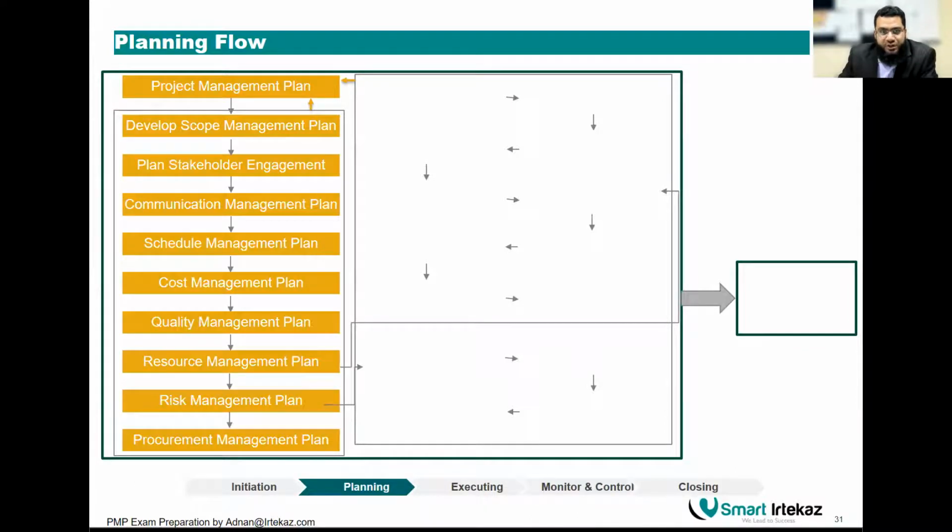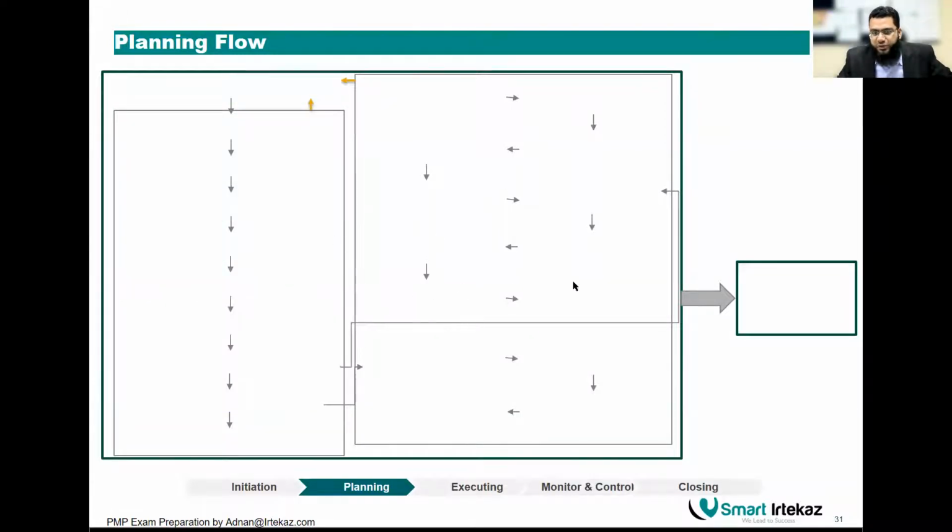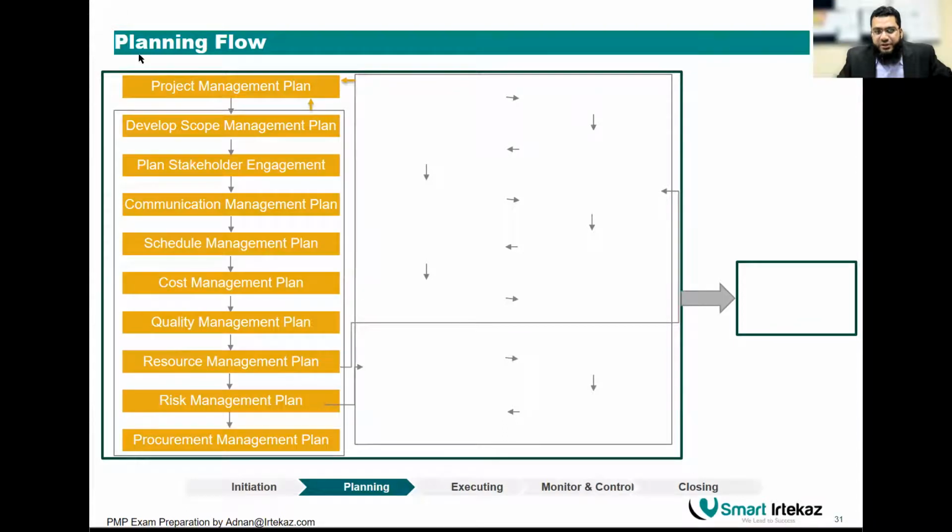to make sure of what's happening, and majorly after we complete our planning. So what happens is when you start the project planning, and you can see the boxes there, right? And you can see the arrows. So you start with the project management plan. That's the first process you start with. But actually, that's the last process you end with. So project management plan, think of this as a folder. And in that folder, there are all other plans, such as your communication plan, your procurement plan, your risk management plan. All the plans are within this folder. So you start getting the folder. You start with developing the project management plan, and then you go and complete other plans. All the other plans are here.